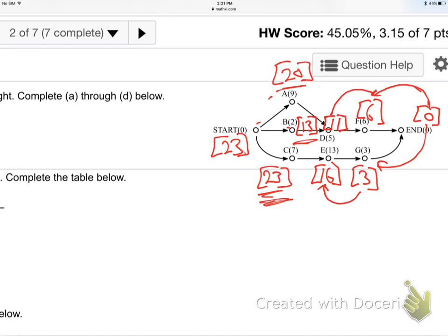Okay, now, so when we go to make decisions, we're gonna use those numbers to help us know what job to do next. Always going with the highest bracketed number, because that's the highest path. So we're not going to pay attention to the parentheses numbers anymore. Everybody understand the difference? The parentheses is just how long the job takes. The bracket is how long from there to the end on the path. Okay, so that's what they want on the table.